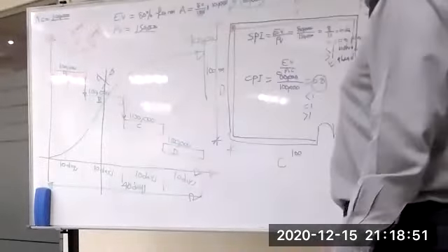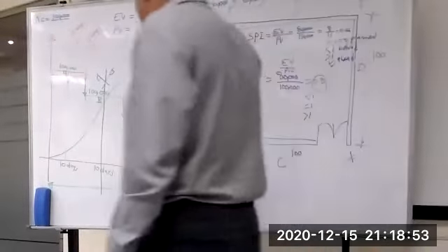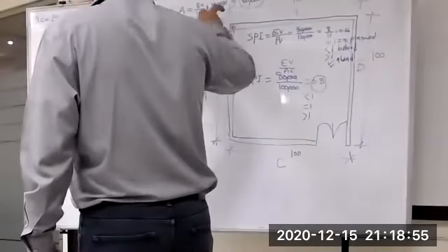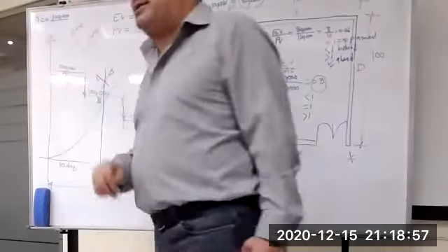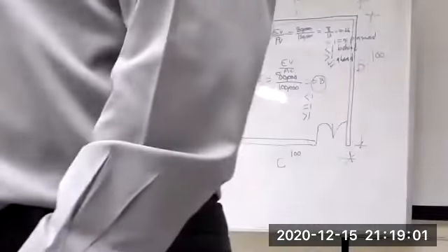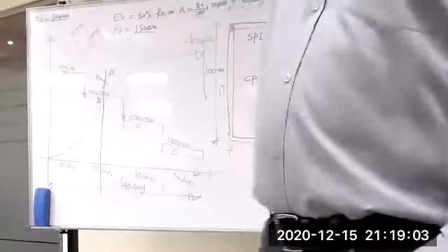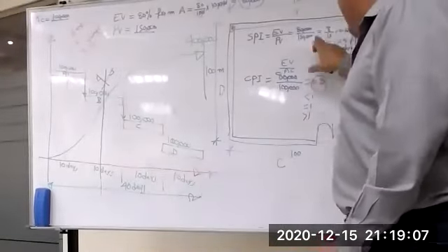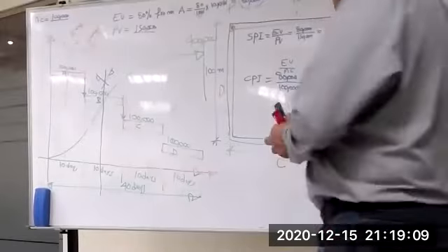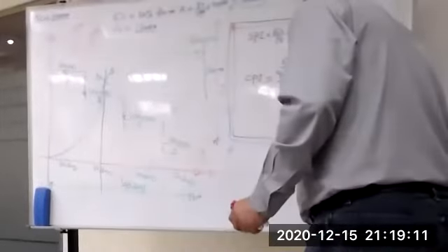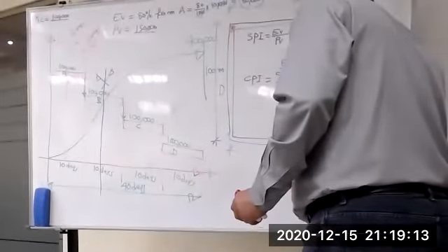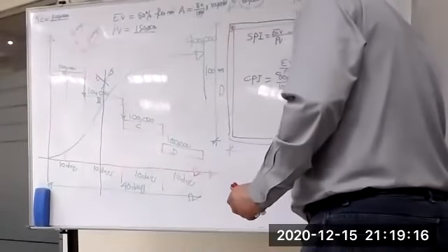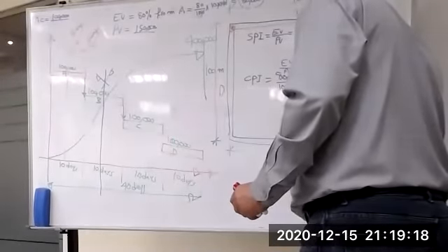Now assume you are going to pay 60,000. I'm giving you an assumption. You pay 60,000, 80 divided by 60, you get more than 1, you are under budget. But in this case, you are behind, and you pay here as planned. And here is over budget.